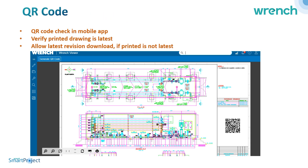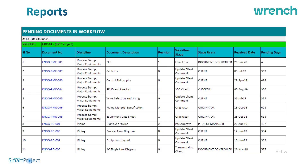When drawings are finally issued and printed outside your system, a QR code is printed on each drawing. A mobile app is provided so you can check and verify that the printed drawing you are about to use is the latest revision, ensuring that no document of an older revision is in use for actual construction or any other purpose.